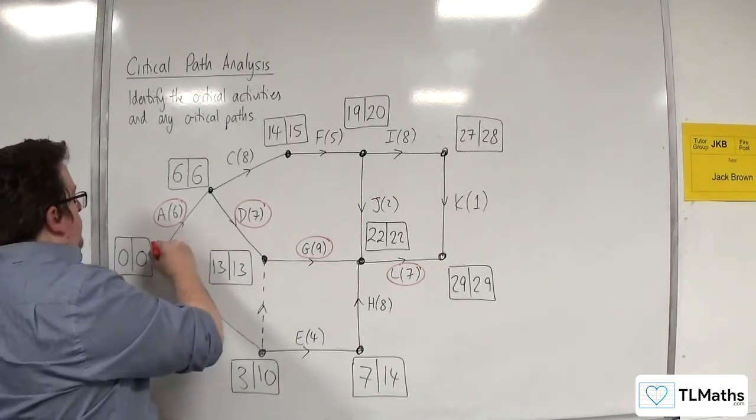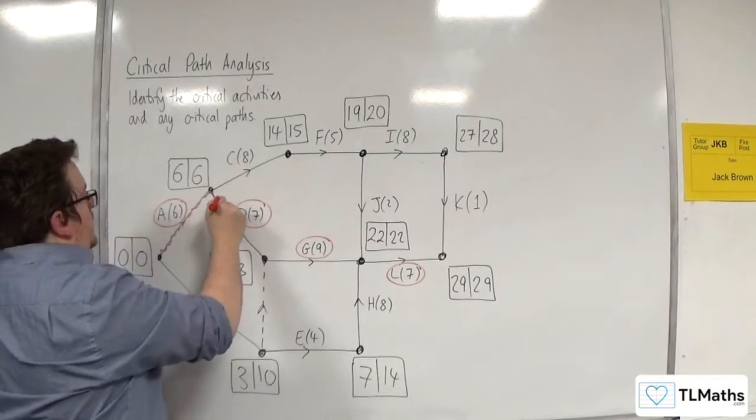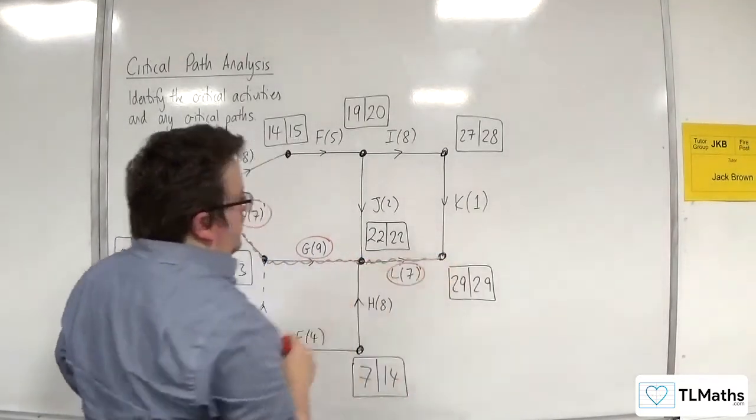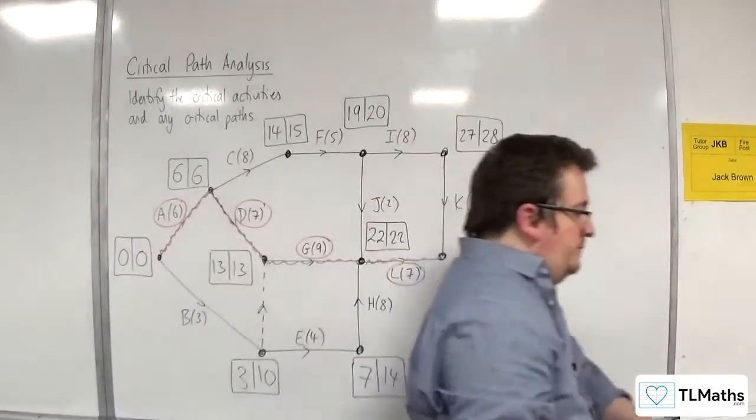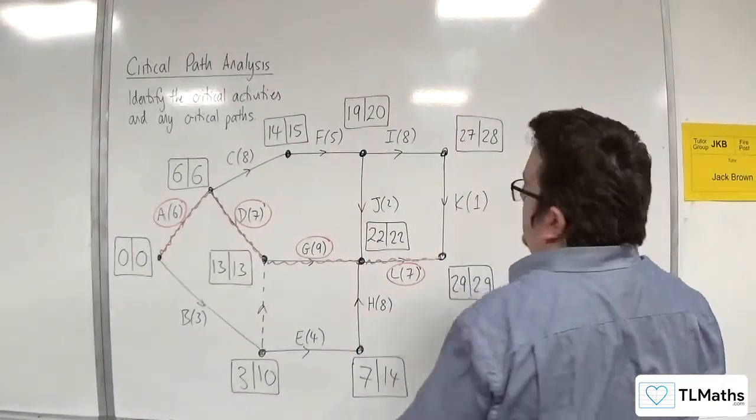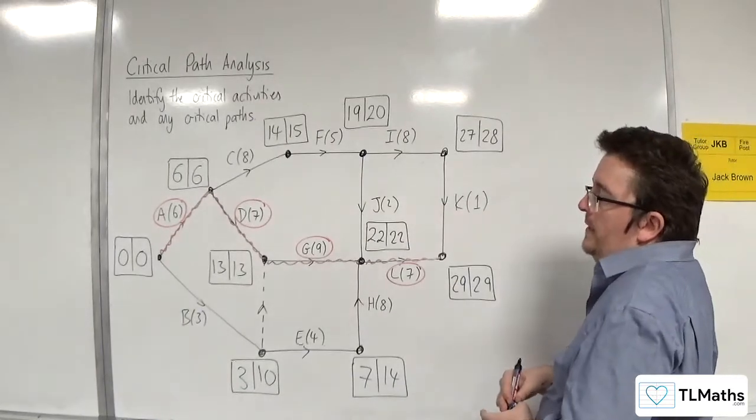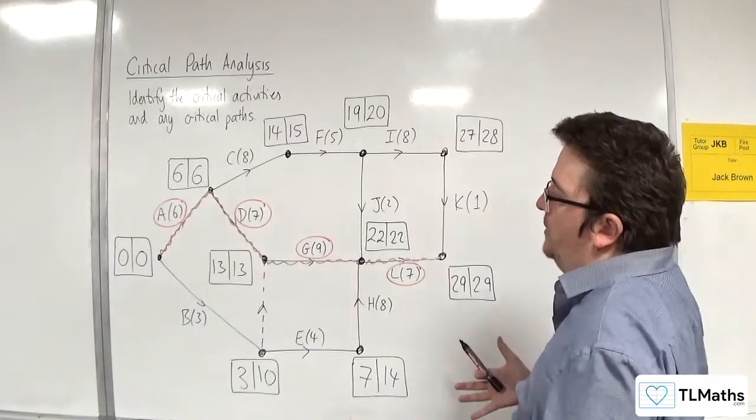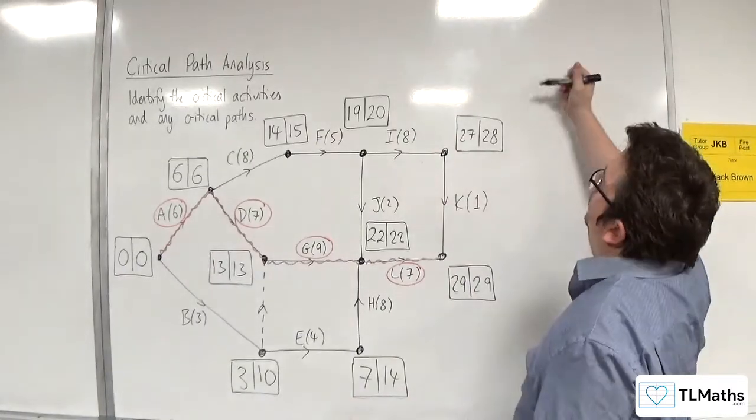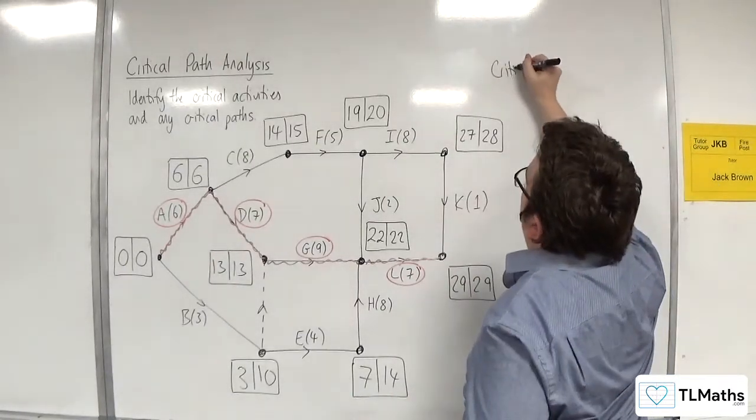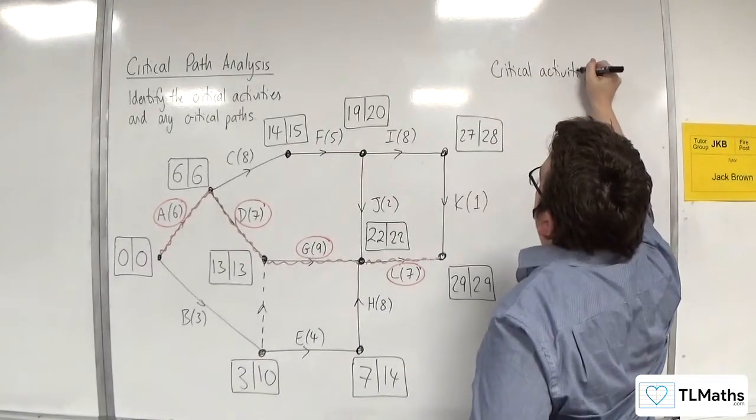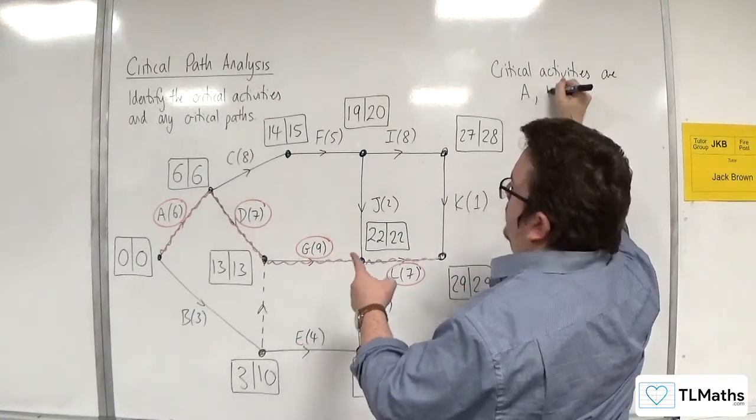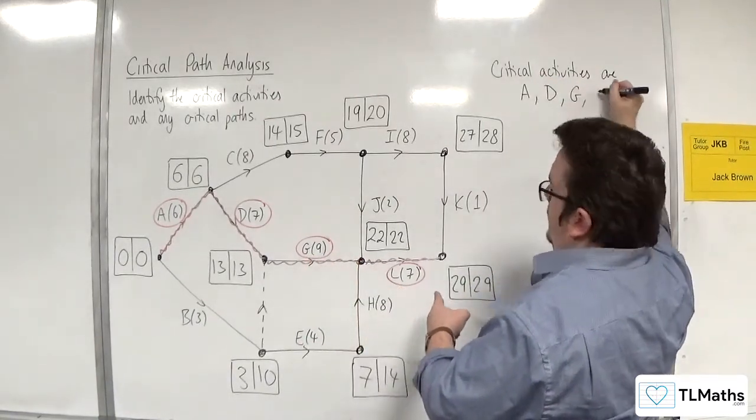And what you should see is that your critical activities form a critical path through your network. So essentially, those activities have to be completed on time. Otherwise, the whole project overruns. So the critical activities are A, D, G, and L.